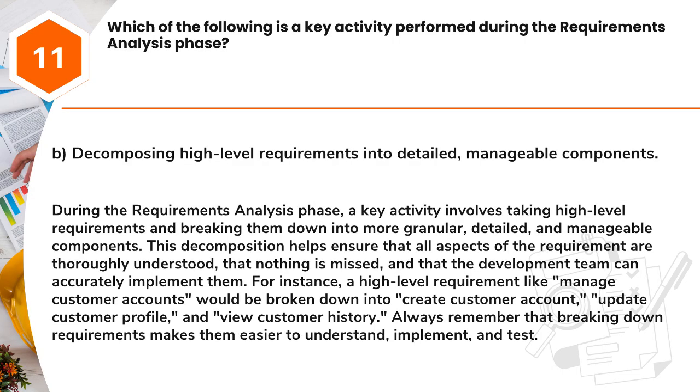Answer: B. Decomposing high-level requirements into detailed, manageable components. During the requirements analysis phase, a key activity involves taking high-level requirements and breaking them down into more granular, detailed, and manageable components. This decomposition helps ensure that all aspects of the requirement are thoroughly understood, that nothing is missed, and that the development team can accurately implement them.